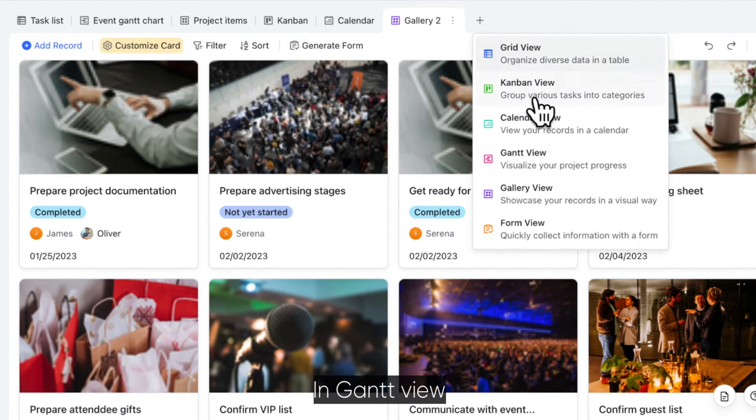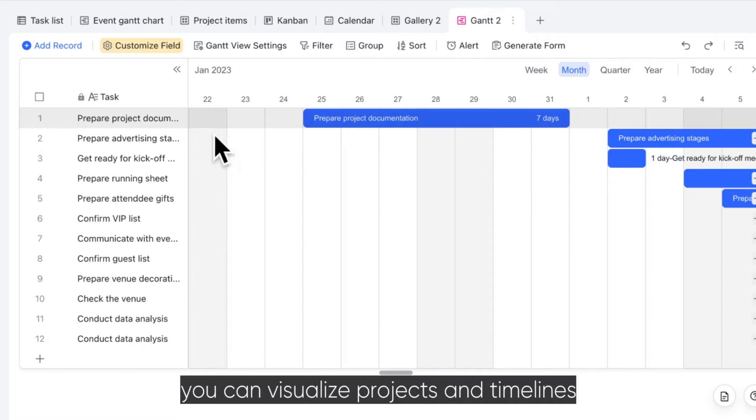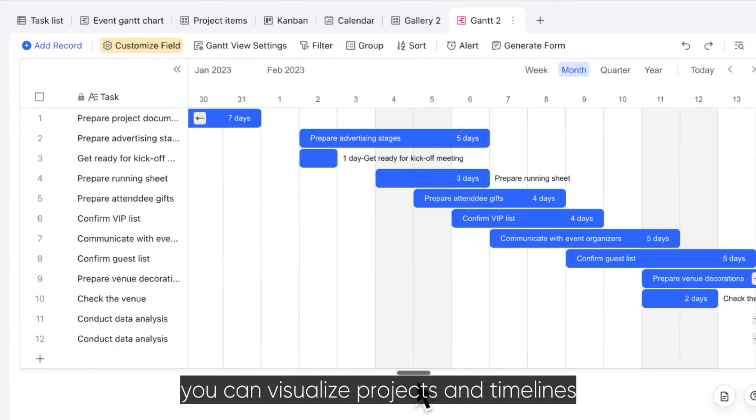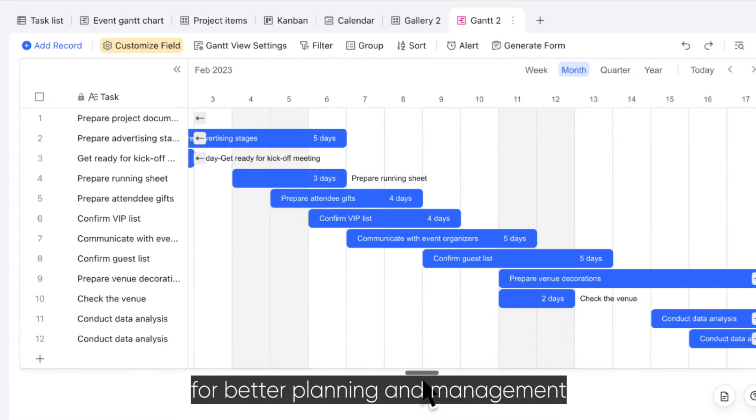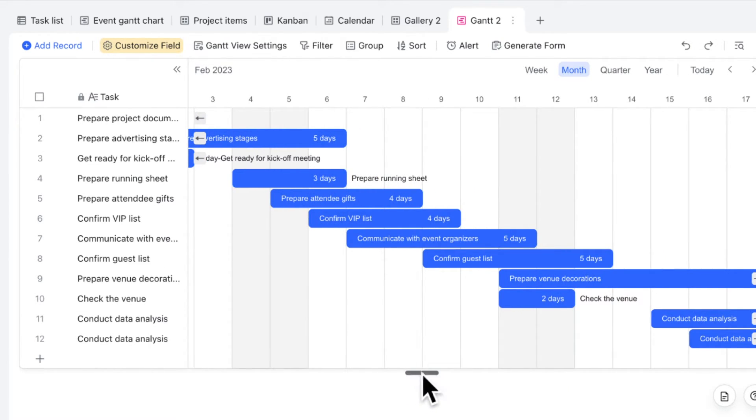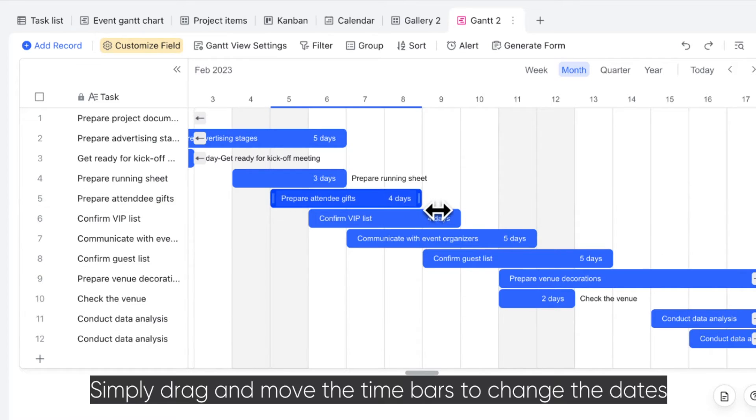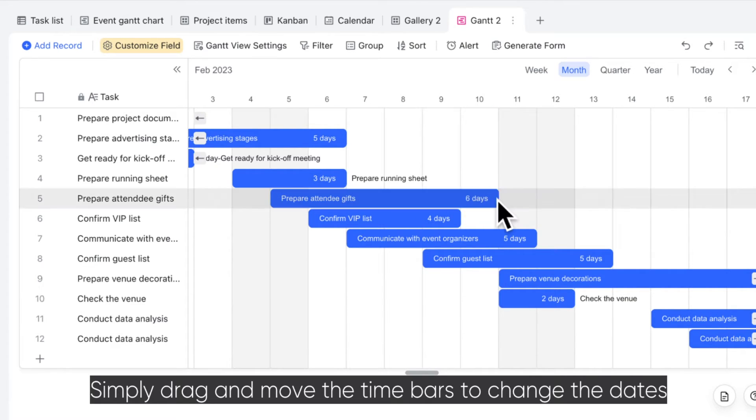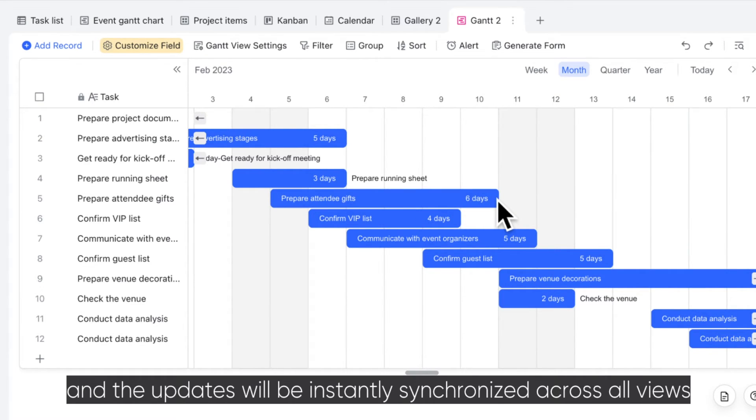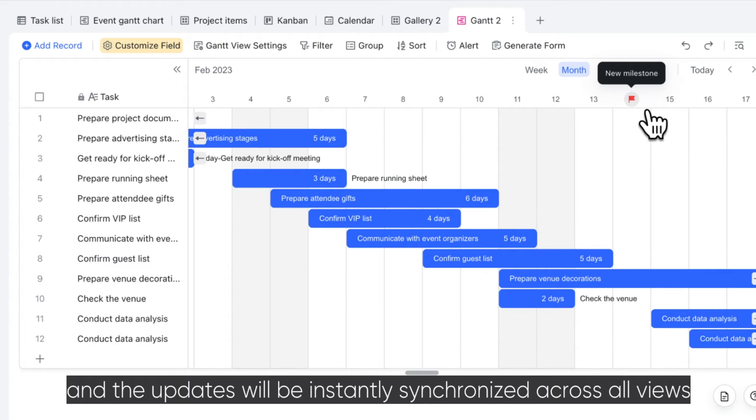In Gantt View, you can visualize projects and timelines for better planning and management. Simply drag and move the time bars to change the dates and the updates will be instantly synchronized across all views.